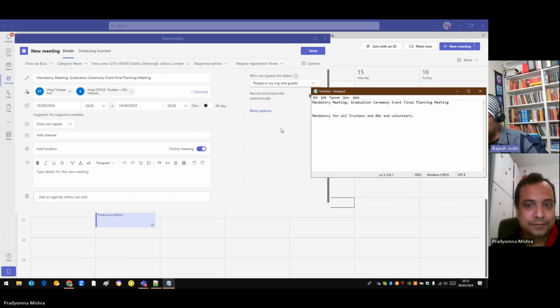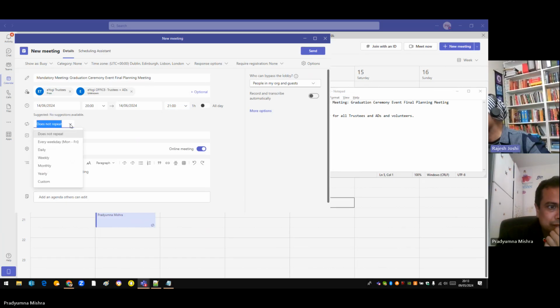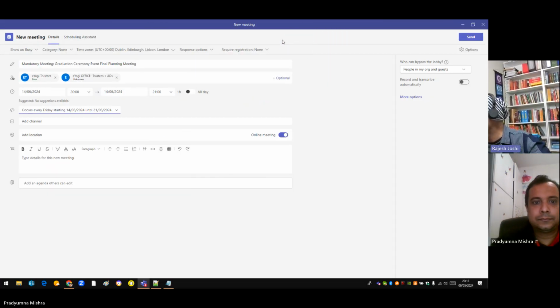Basically, what we are doing is creating all the events. So in summary, 6 weeks before, we are kicking off a once-every-week meeting. 3 weeks before, we should have 2 meetings per week. So that's from 3 weeks onwards when the event is happening. And when you have 1 week left, you should again have a Tuesday event and one weekend event. Like in this case, VHCCI, if the event is happening on Sunday, then you should be there on Saturday evening, look at the venue and rehearsal. And along with that, you should have 2 rehearsals at a minimum.